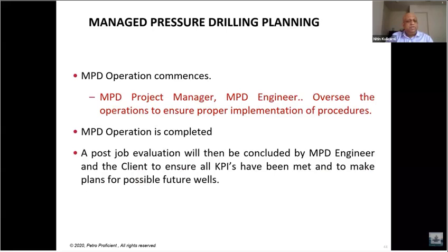So usually when the operation commences, you have the project manager and the project MPD engineer. They usually oversee the operations and implementation. After the operation is completed, an MPD engineer would typically complete the end of well report and analyze whether all the KPIs of the particular MPD project were met. Key performance indicators: what the objectives were and whether our objectives and key indicators were achieved or not.